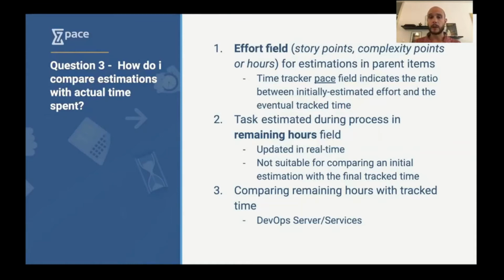The second thing you can do is to update the remaining hours or remaining work field. That's also very helpful, not as much for comparing the initial estimation with the time track, but it's more of a snapshot of your current progress.